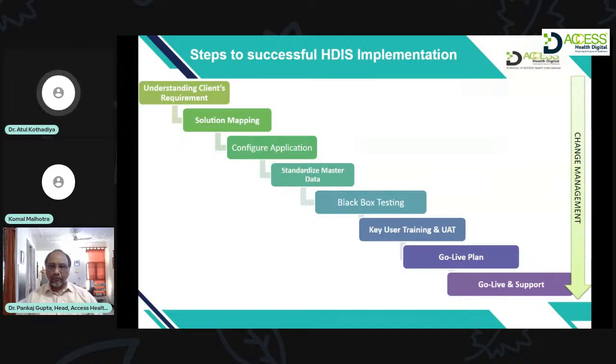We never went to the end users to understand their processes, to see how they were operating in their department. If that had been done, we would have been in a better shape while implementing it. Of course, we did a lot of requirements later on. The go live date was moved 3 months ahead. We did everything to meet all the requirements, and finally we did implement it.